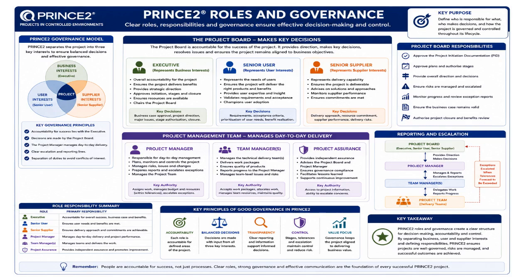The project board provides direction to the project manager. The project manager coordinates team managers and delivery teams. Delivery teams report progress upward, while exceptions are escalated upward when tolerances are forecast to be exceeded. This reporting structure is closely linked to the PRINCE2 principle called Manage by Exception.